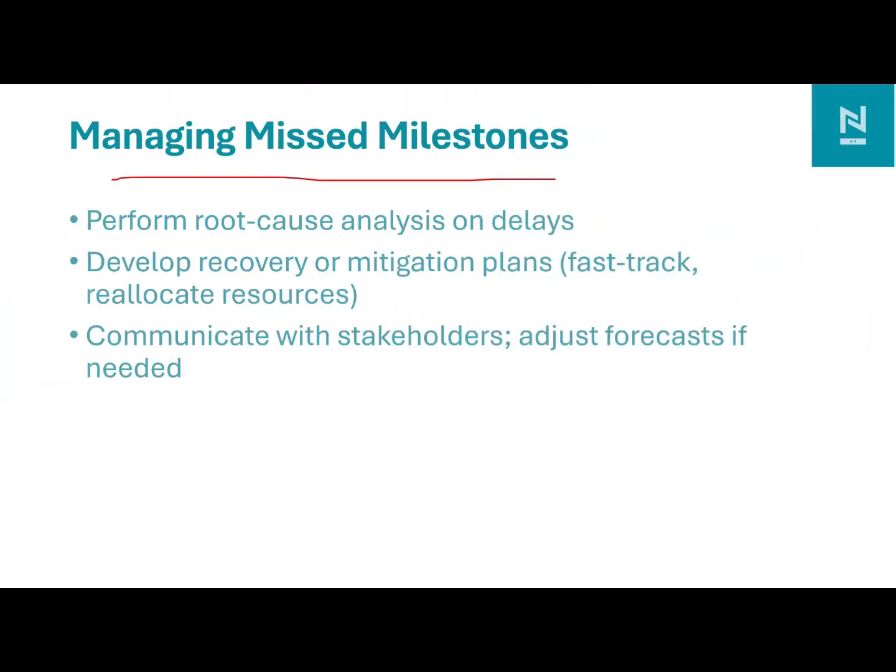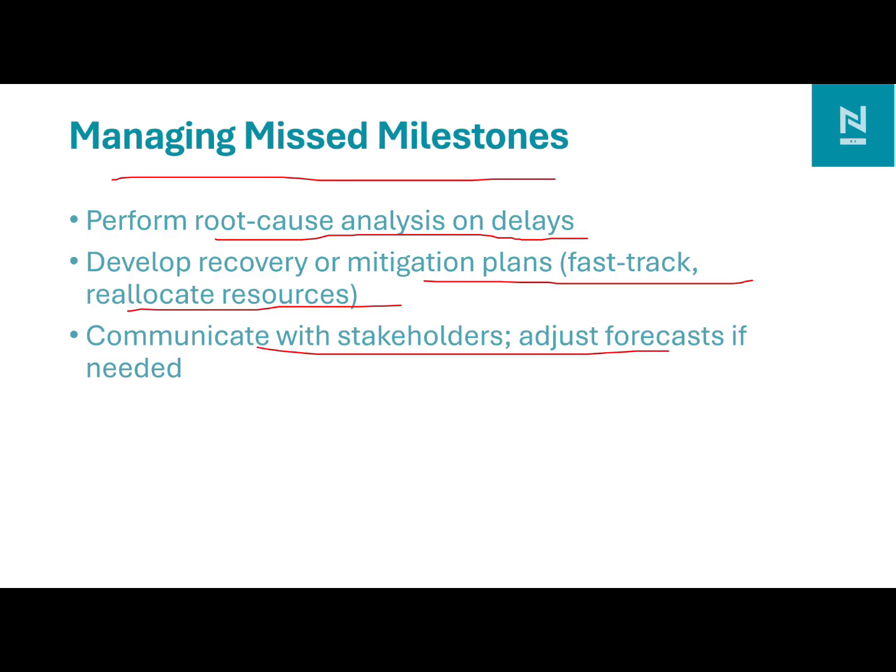Managing missed milestones. If a milestone is missed, we can perform a root cause analysis on it. What was the cause or reason for the delay? We can develop a recovery plan or mitigation plan, for example fast tracking of the project or reallocation of resources to the project. We can also communicate with the stakeholder and adjust as per the requirement of the client.